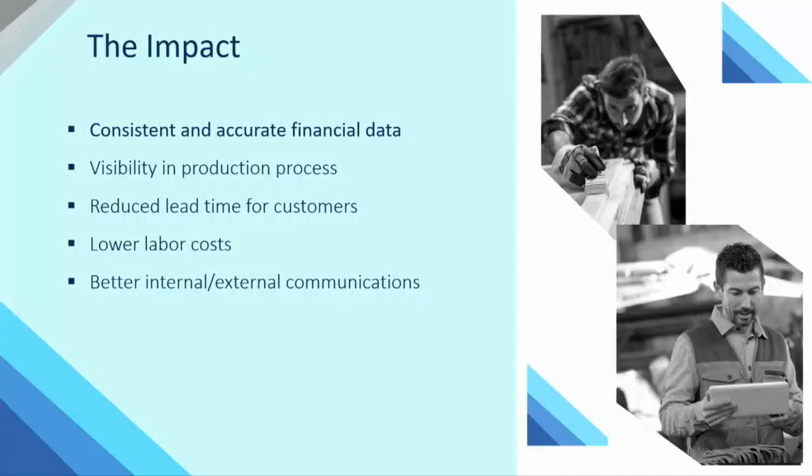We don't have the entire team of 8 people throughout the process. Essentially, when you're doing the business analysis process, we have just a couple of people, and then we ramp up the teams as we do more customization and during the development phase, and towards the end, as we have the training and UAT done, then we ramp down the team, right? So that's what we do. Yes.